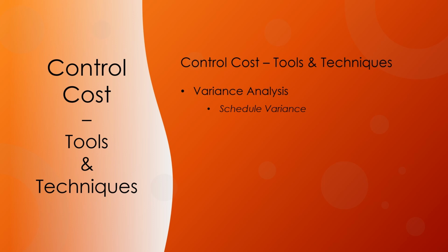The EVA schedule variance is a useful metric in that it can indicate when a project is falling behind or is ahead of its baseline schedule. The EVA schedule variance will ultimately equal 0 when the project is completed because all of the planned values will have been earned. Schedule variance is best used in conjunction with critical path method scheduling and risk management. SV is calculated as EV minus PV.